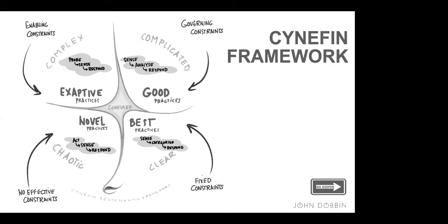The cause is known, users saving files. The effect is known: if we put more storage, we're going to have more capacity. So it's the simplest of our problems. It can be conducted very simply through a linear process. We don't need any teams. We just need to write a purchase order, or write a small project plan to get some more offline archival happening.